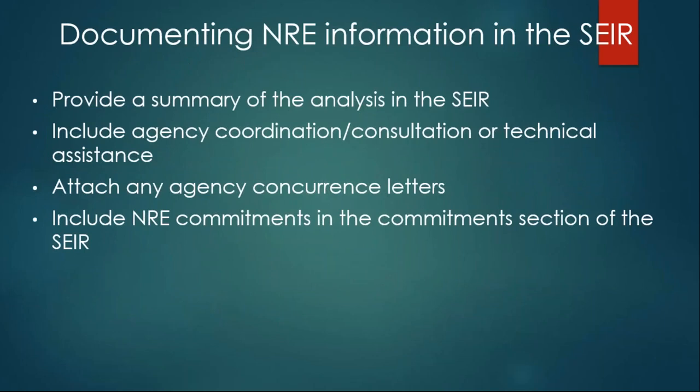So, documenting the natural resources evaluation in the SEER. I included SEER mostly for the Turnpike audience today, but similar to what Matt was talking about earlier, we're going to be providing the summary of the analysis in the SEER, and include agency coordination or consultation or technical assistance information in the SEER. The NRE itself is not attached to the environmental document, but any agency concurrence letter should be attached to the environmental document.